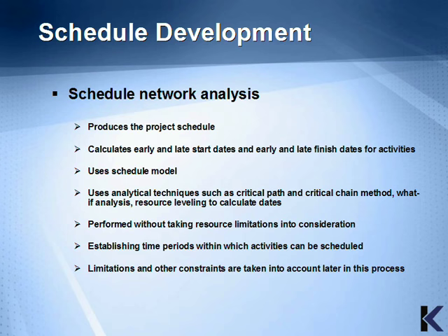The schedule network analysis produces the project schedule. It calculates early and late start dates and early and late finish dates for activities. It uses the schedule model, and it uses analytical techniques such as critical path and critical chain method, what-if analysis, and resource leveling to calculate the dates. It's performed without taking resource limitations into consideration, and it establishes time periods within which activities can be scheduled. Limitations and other constraints are taken into account later in this process.